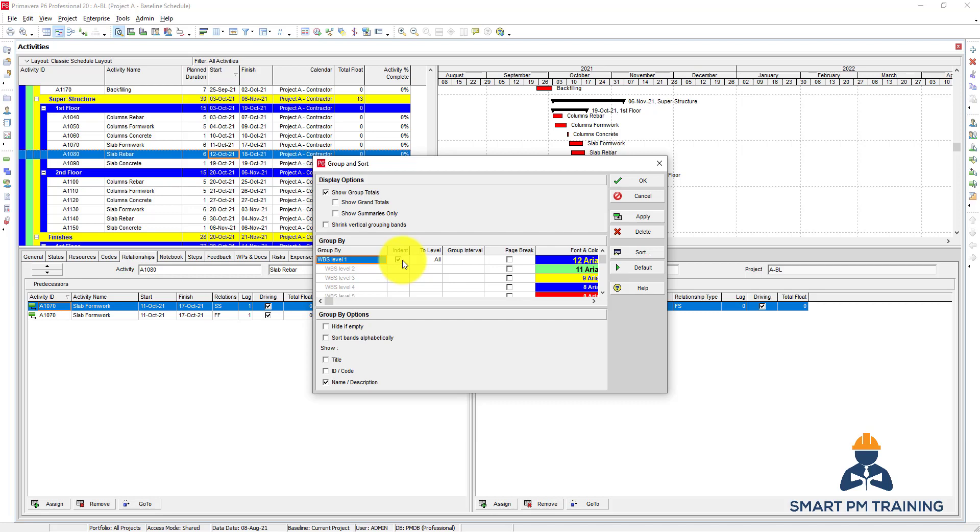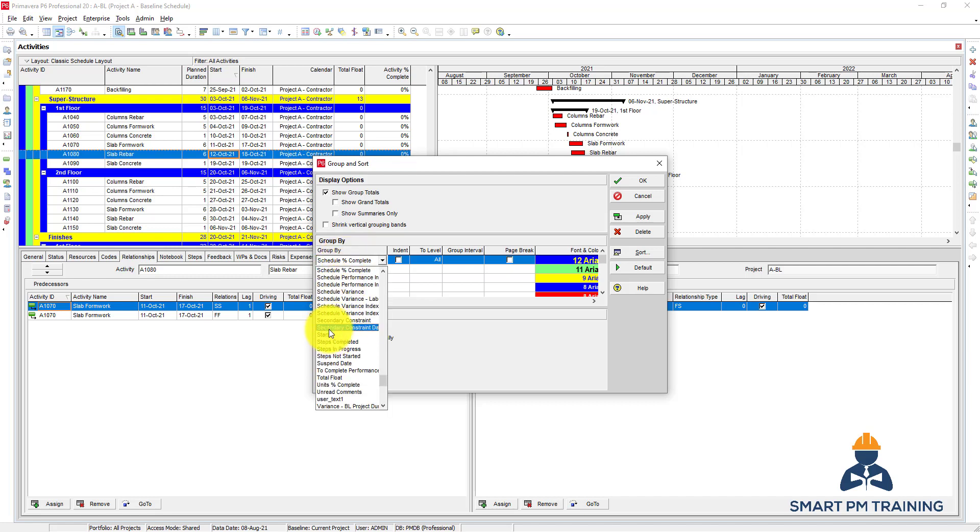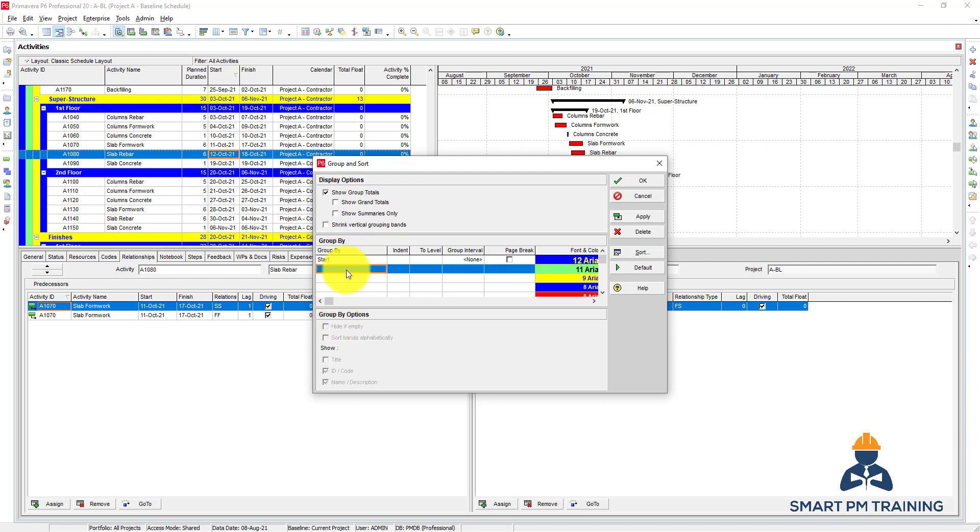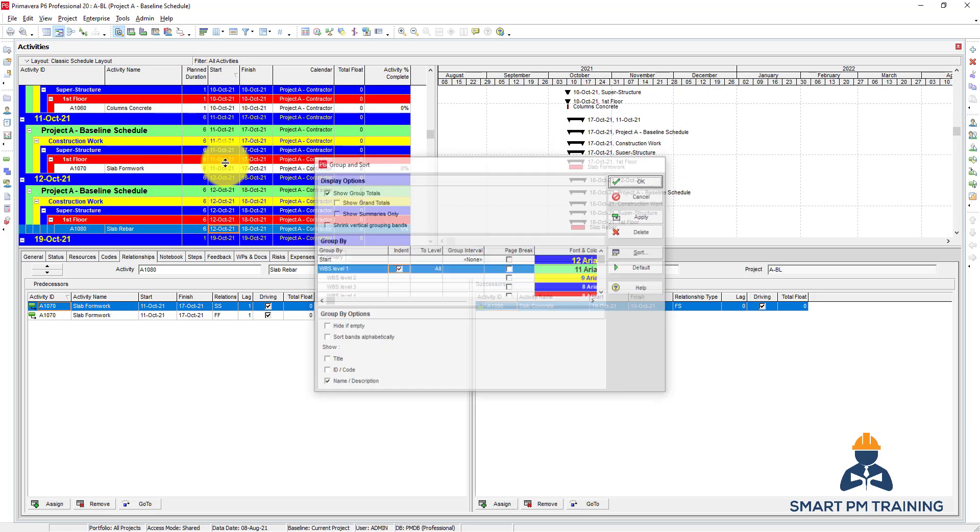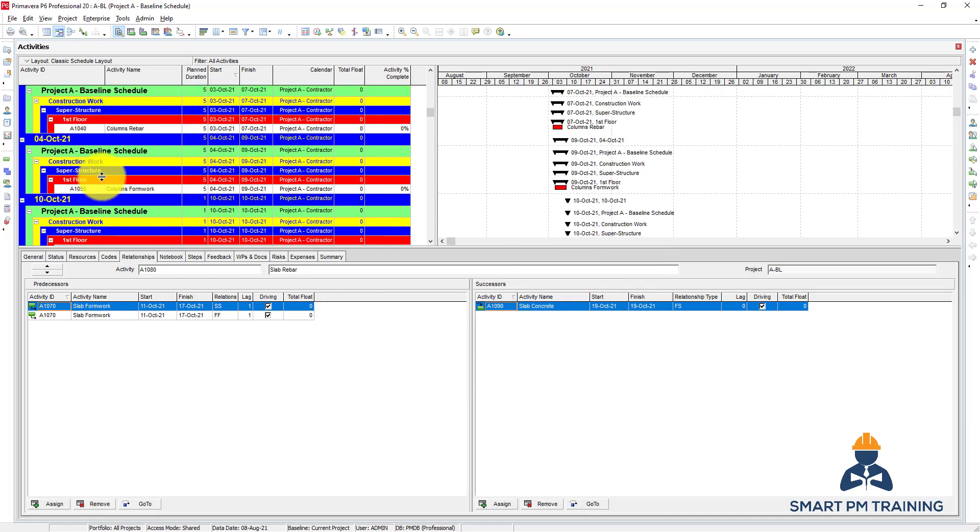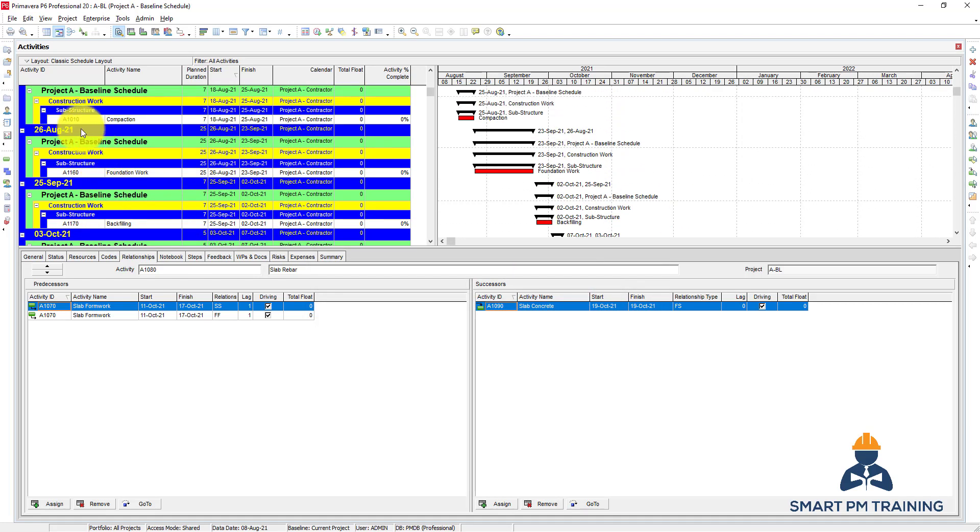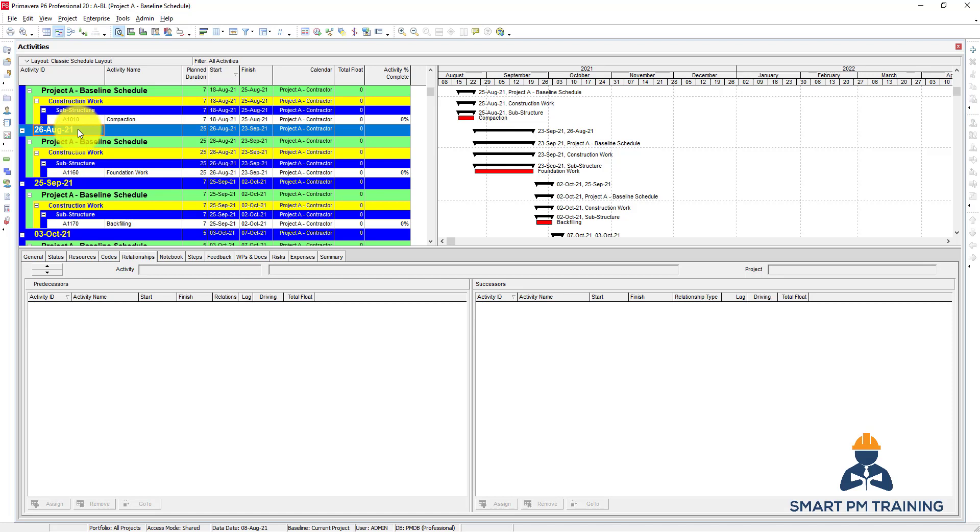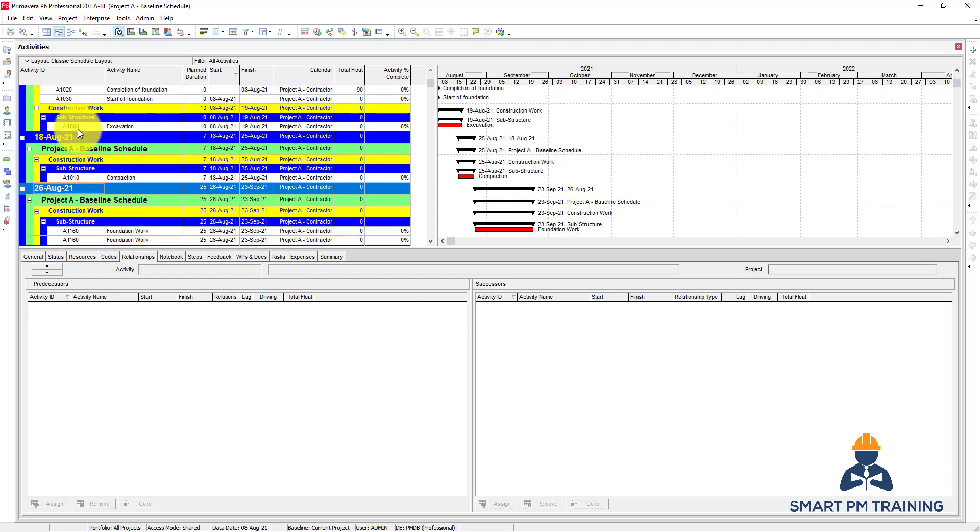Let's say I want to group by start date. I want to also group by WPS and make it indent. So it will first group, the first level is by start date.